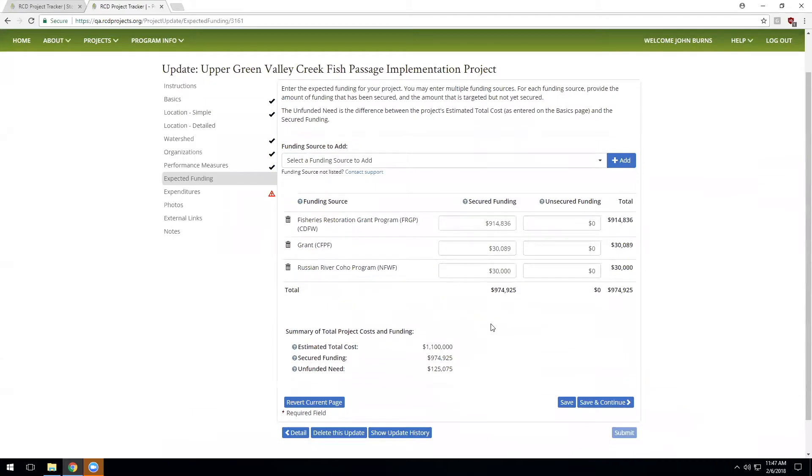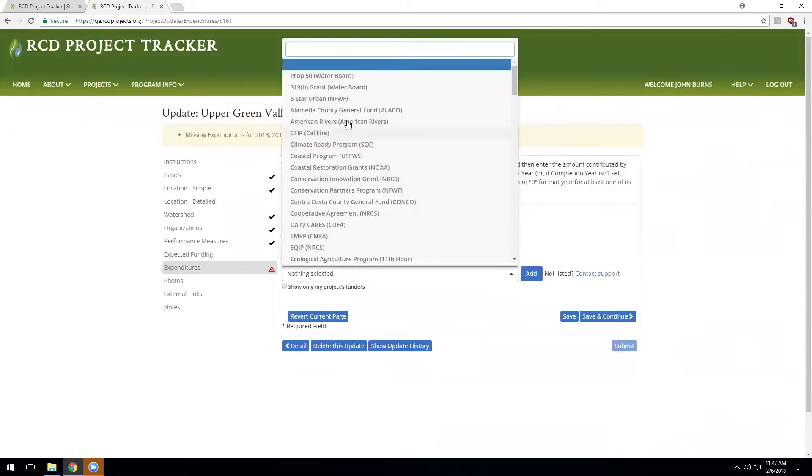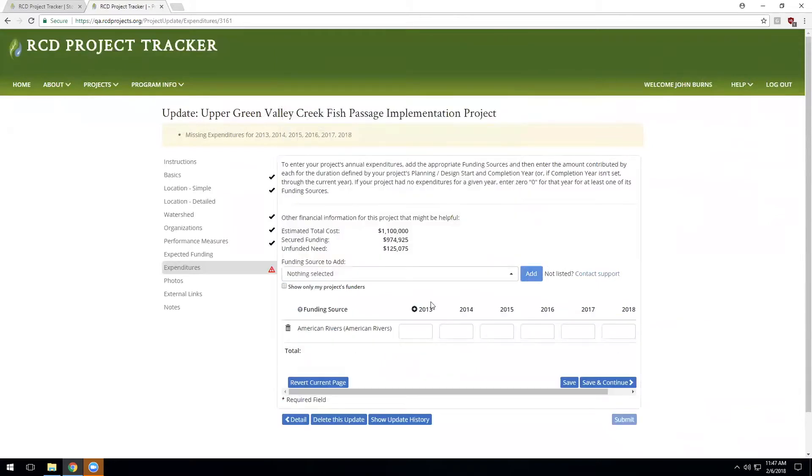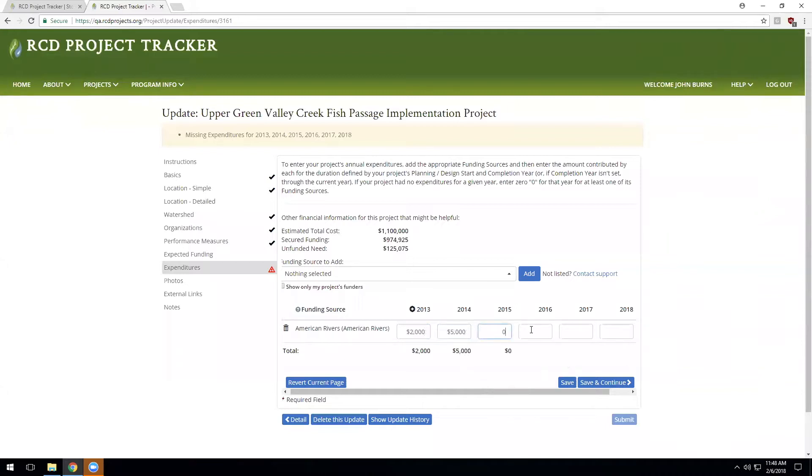The expected funding was entered for this project when it was in the planning design phase, so we can just review that this looks complete as of the planning and design part of the project. Now we move on to what was actually spent. We can add some expenditures. The system asks for a record of expenditures for the entire time the project was active. This project planning design began in 2013 and the project was not complete until 2018, and so we need to enter the expenditures for every year that this project was active. If in a given year you had no expenditures because the project was on hold, you can simply enter zero for that year.